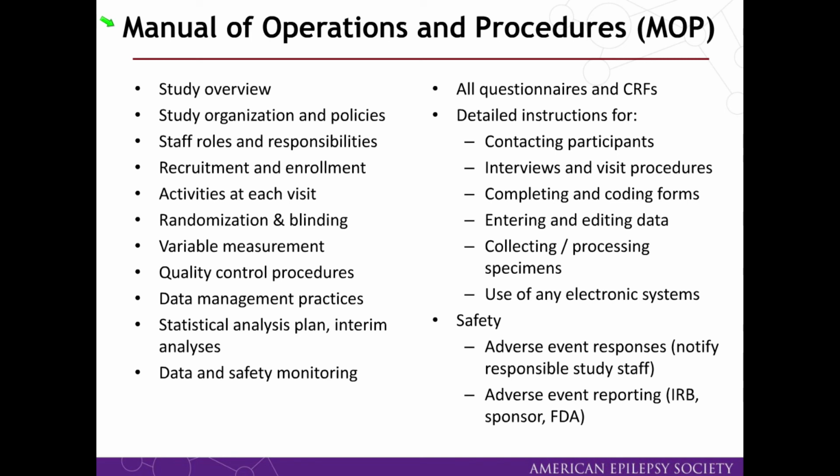So there'll be an overview, a list of all of the people involved in the study, both at your own institution and, if this is multi-center, across other institutions, descriptions of the roles and the responsibilities of all of the staff in the study, a detailed description of how patients are recruited and enrolled, activities at each visit, and if this is a randomized study, how that is achieved and how patients and providers are blinded.